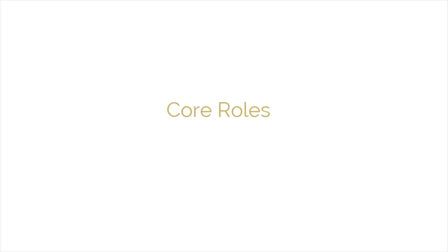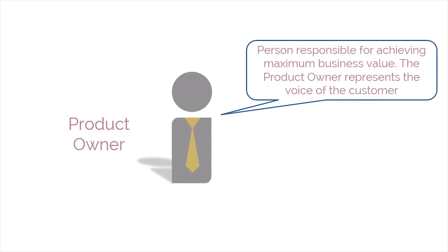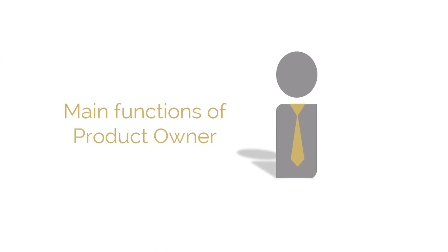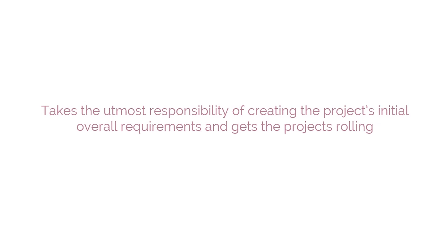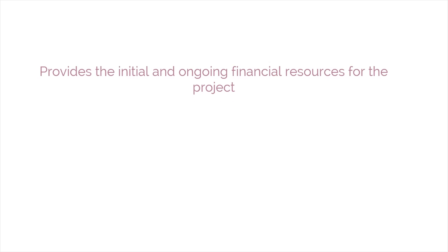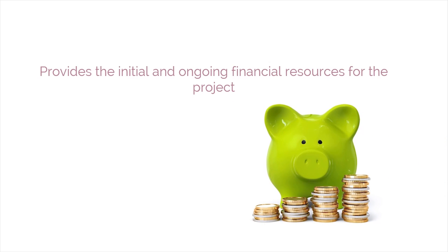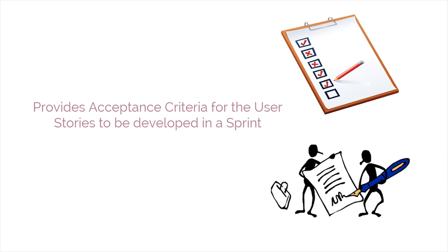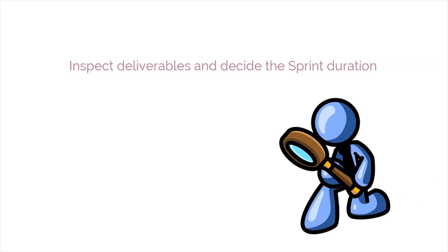Now let's run through the core roles in Scrum. We'll start with the product owner. This person is responsible for achieving maximum business value and represents the voice of the customer. The product owner takes responsibility for creating the project's initial overall requirements, appointing appropriate people to the Scrum Master and Scrum team roles, and providing initial and ongoing financial resources for the project. He or she determines the product vision, assesses viability and ensures delivery of the product or service, decides minimum marketable release content, provides acceptance criteria for user stories to be developed in a sprint, inspects deliverables, and decides the sprint duration.